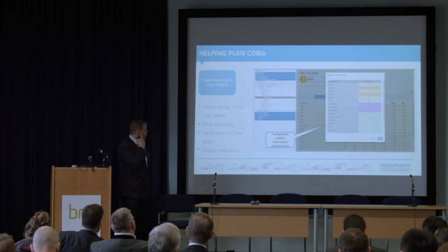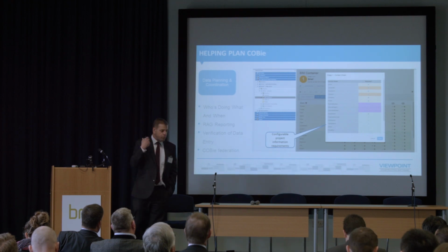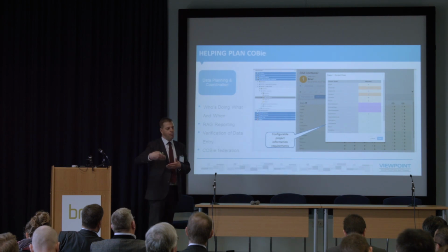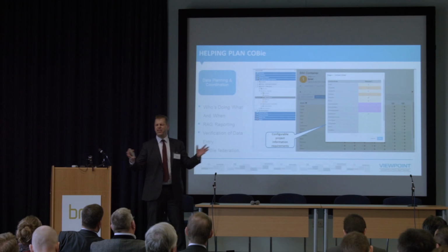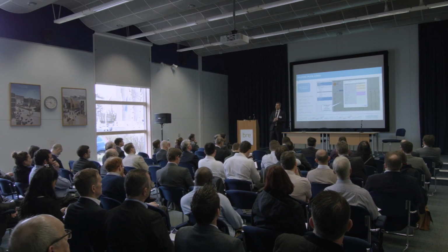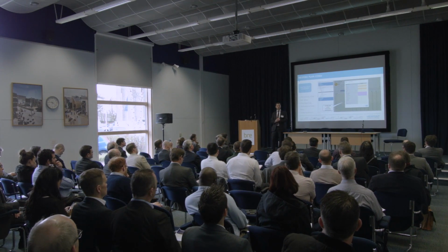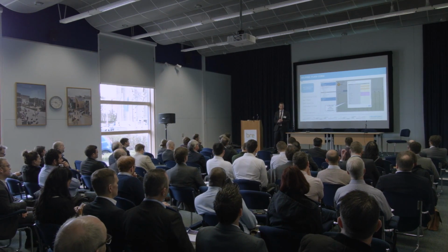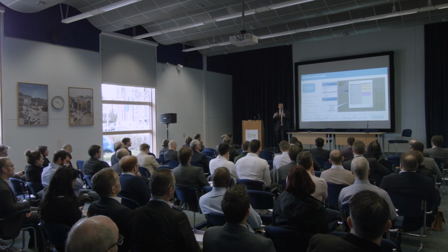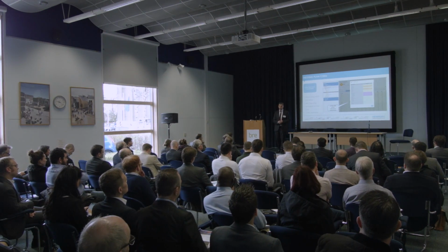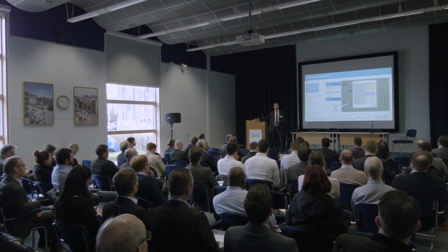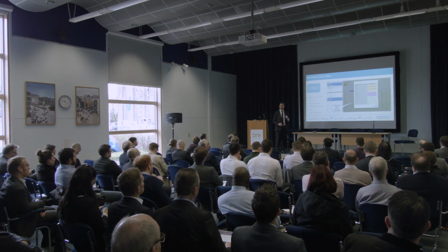So you should be able to RAG report. You've defined, at the start of the job, as part of putting together your requirements for each person. Every contractor has this awful thing. They've had an EIR, which hopefully includes what the COBie deliverables are going to be, and the client hasn't just said, I want everything. You've had an EIR, you've got your COBie deliverables, you may have a supply chain of 200-300 different companies, each of whom has to do a little bit. So you have to divvy up that work.